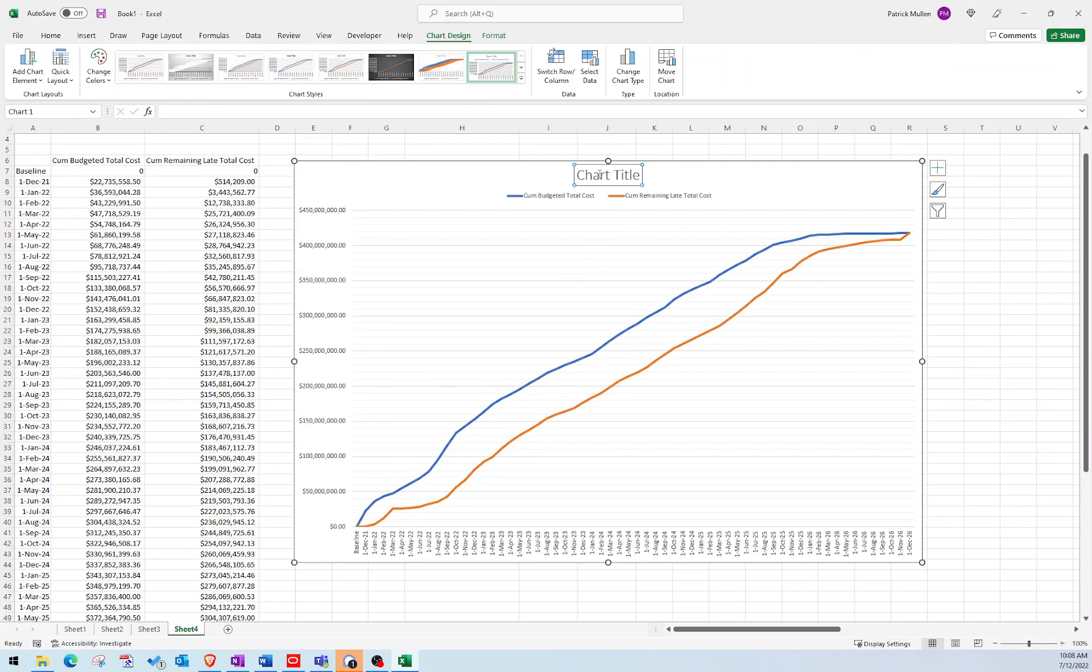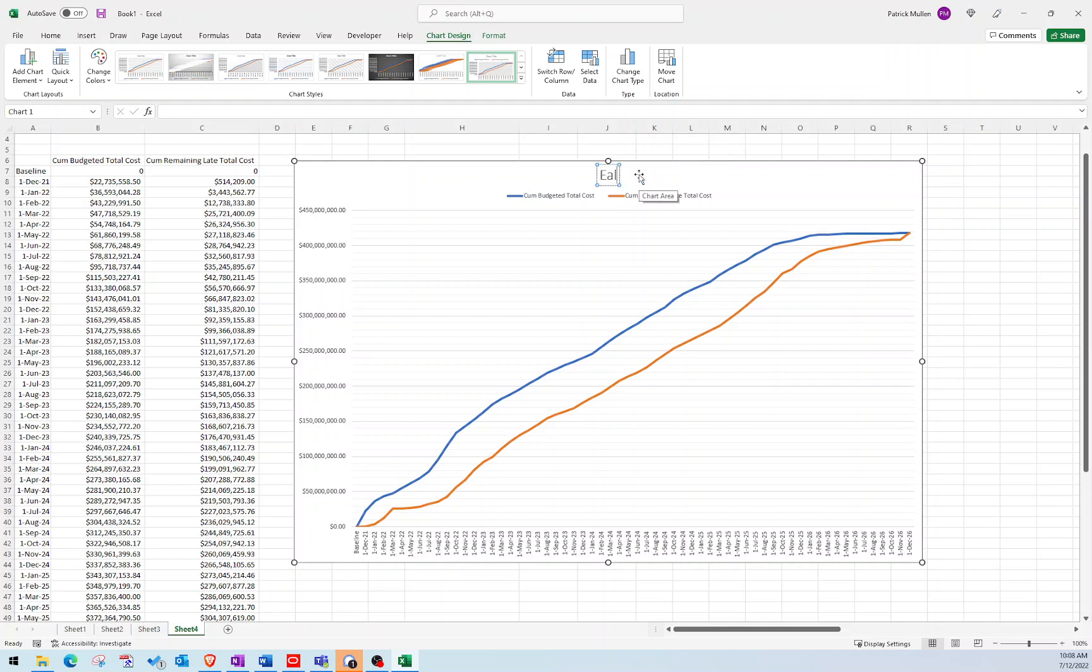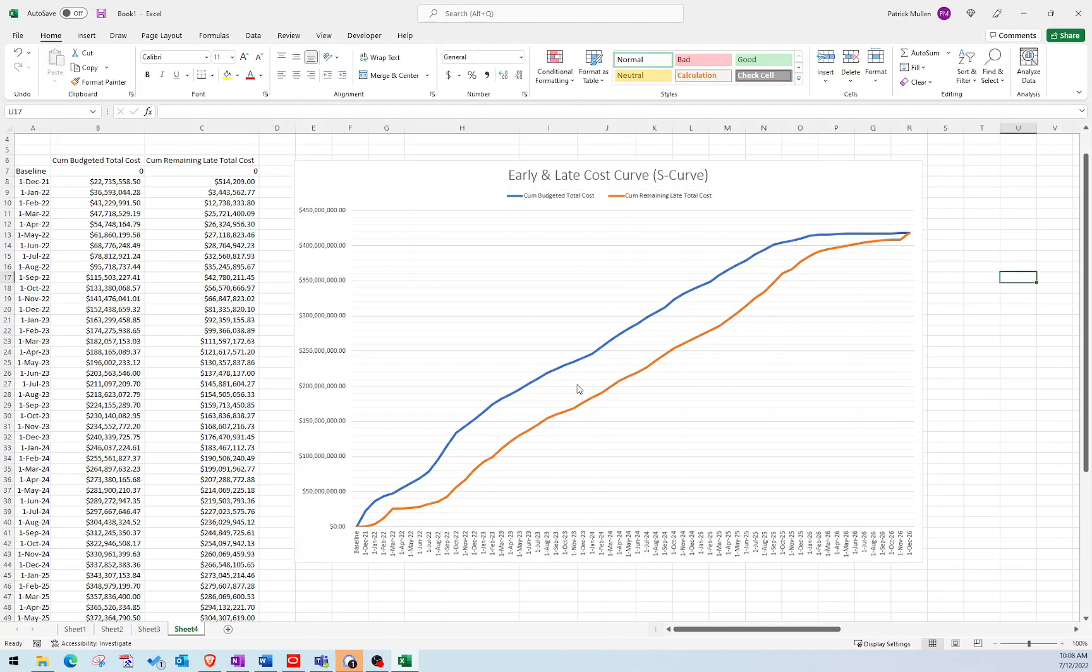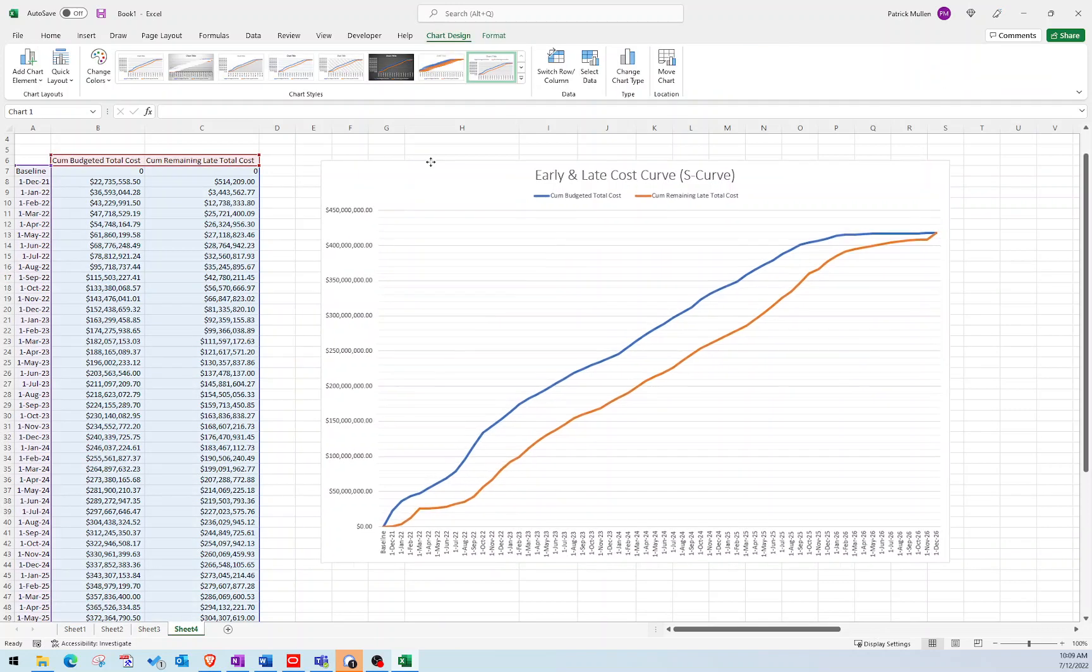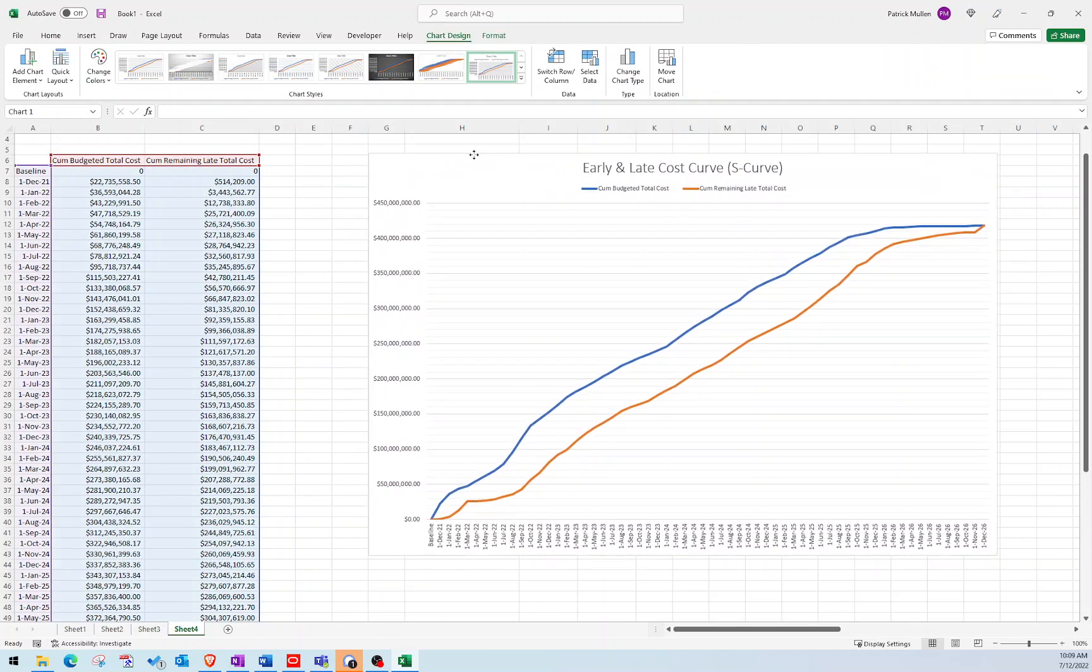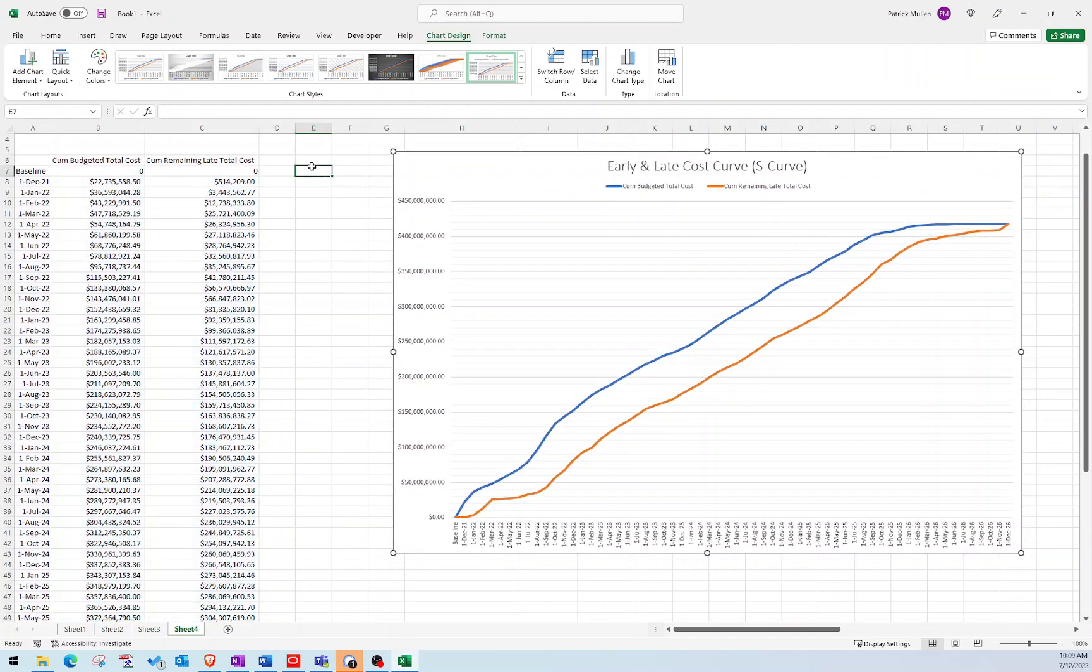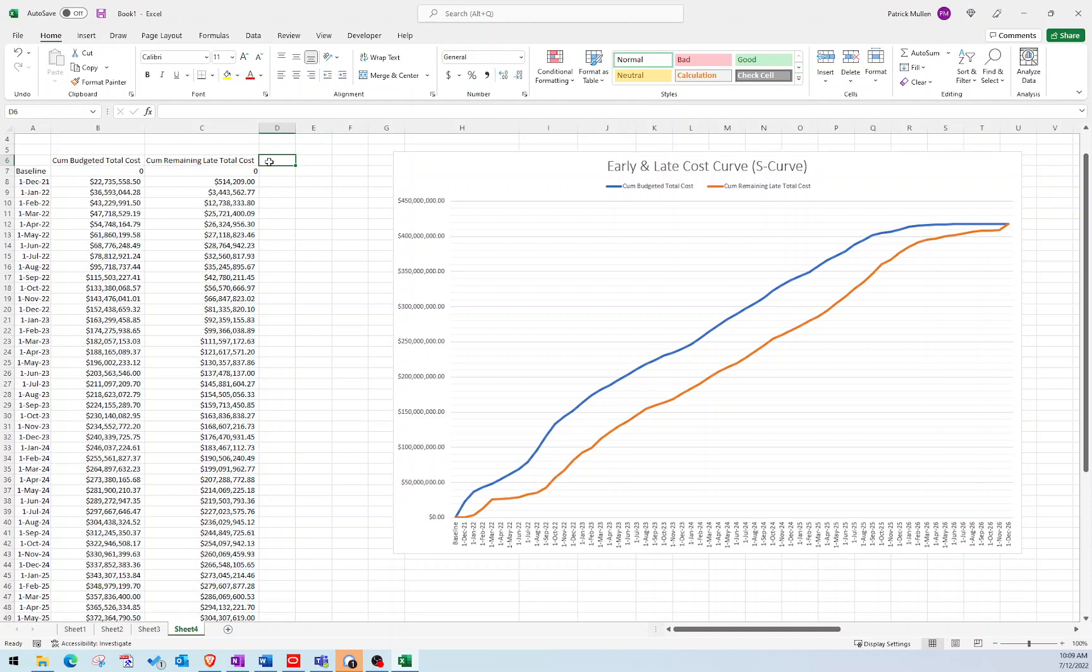And then my chart title, I'm just going to change that to early and late cost curve or S curve in parentheses. And so the thing that I'm missing now is my actual cost curve, which I'm going to be using to plot once I start my schedule updates. So I'm going to add another column here called actual cost curve.